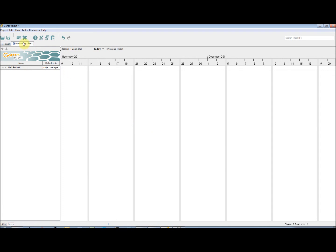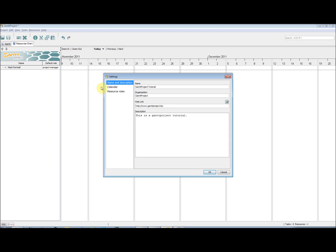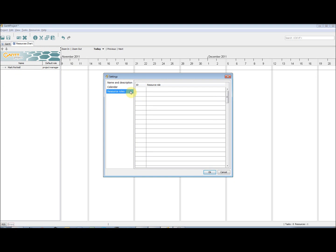To create additional roles, we can go to Project Properties and then, on the left hand side, select Resource Roles. Then, by clicking on the next free slot and typing, we can add in new roles. These will then be available when adding a new resource.